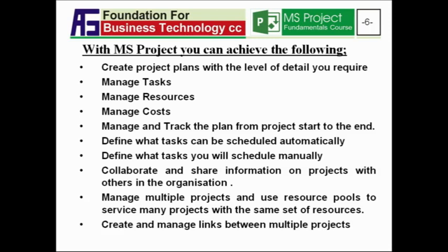We can also create and manage links between multiple projects. At times, certain projects depend on the output from other projects. So project A has got an output that becomes an input in project B. So through MS Project, we are able to manage these multiple projects and define at what stage we have interfaces and what type of interface we have between the various projects.